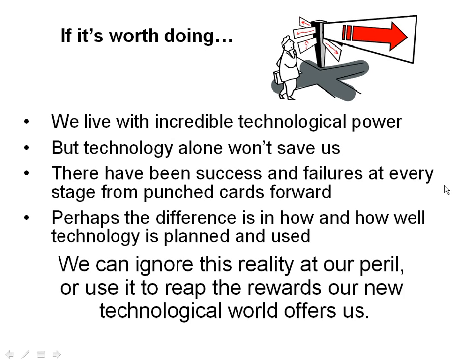And so I would suggest that you look at that, look at the impact on your human parts, your procedural parts. Say, how long is that going to take us? In many cases, for instance, if you work in an industry or part of government that works on cycles, a yearly cycle, a quarterly cycle, it may take several cycles to do one. You may not be able to do things in one shot, and that will delay you, obviously, because you may be able to do some of it, and then you have to wait till the next cycle to do the rest. But if you look at all of those things up front, I think you'll have a fair idea of how long a successful implementation is going to take you.